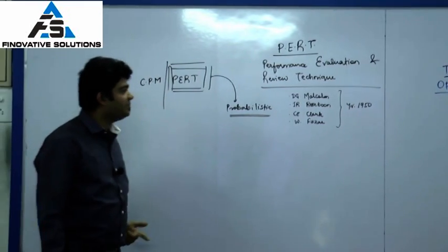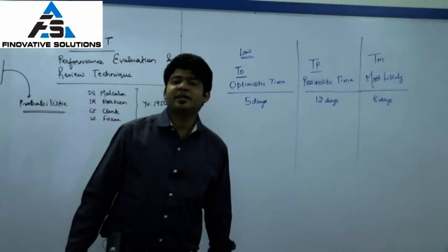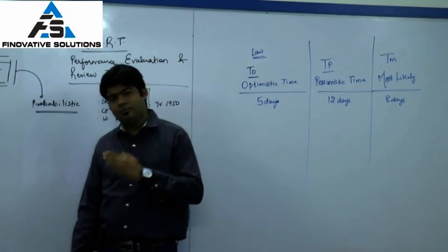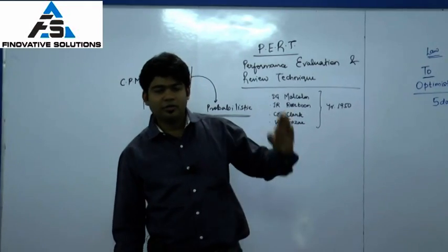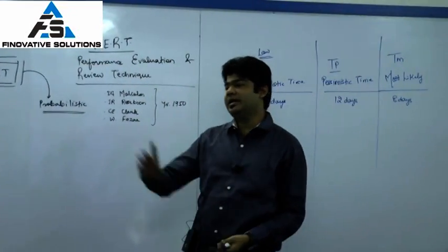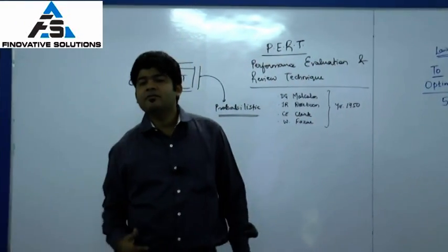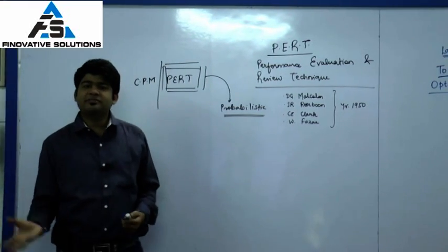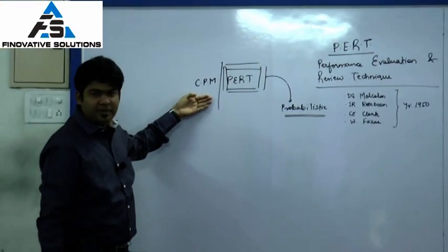Whereas in case of CPM, the duration was fixed. So God forbid, but if there is a second attempt, now I am sure that in order to complete whole law, it will take me 9 days precisely. In order to complete costing, it will take me 8 days precisely. In order to complete DT, it will take me 10 days precisely. So probably when we are done with the same projects time and again, that is when we become deterministic for the same, and that model is called the CPM model.